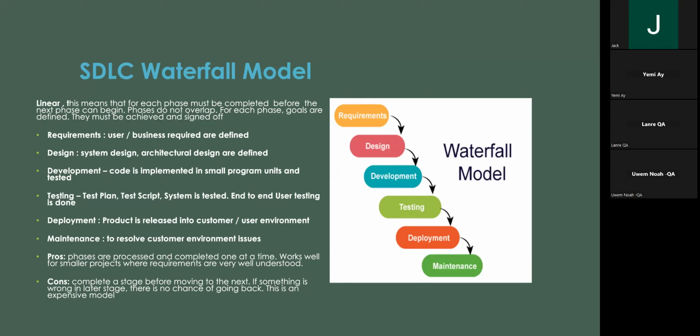So the business analyst will say, we can use 2 months to gather requirements. Don't forget that they will use 2 months due to customers' availability. Within that 2 months, all of us can't do anything because we have to wait for them to gather the requirement. When he finishes after 2 months, the design phase will come. For us to draw this architecture, it's going to take roughly a month and a half. You give it to them, take another 1.5 months.